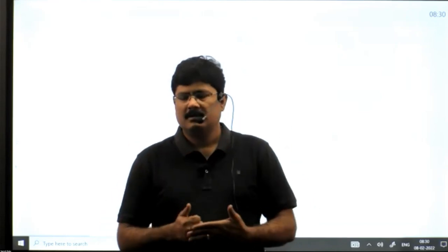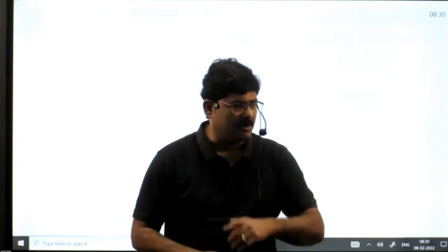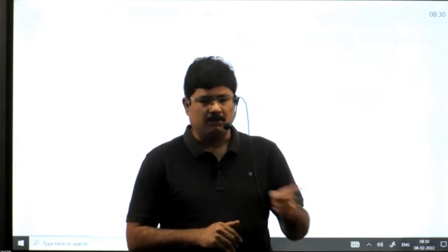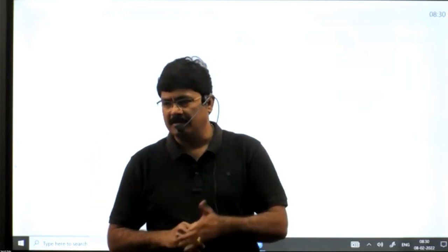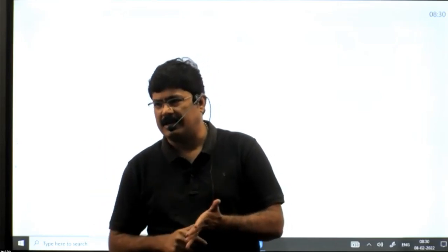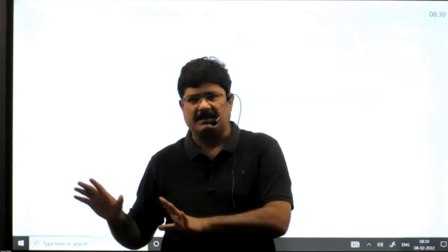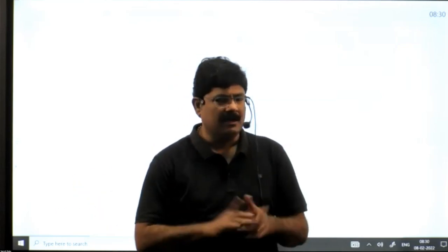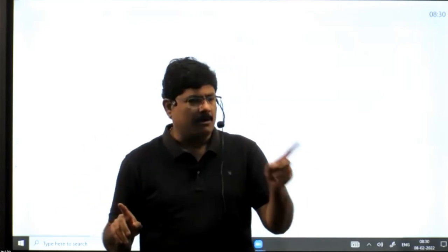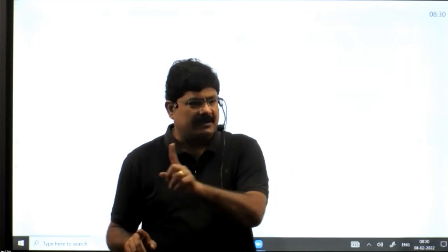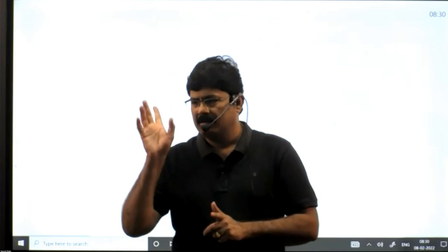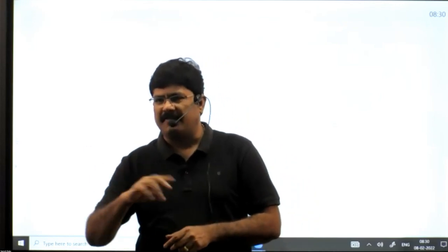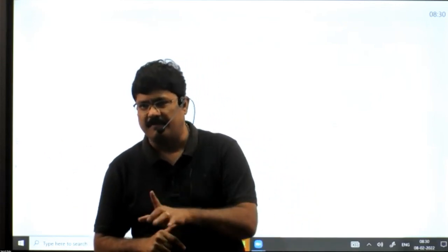Yes. From tomorrow first in the first hour, you give the first build to the QA team. By tomorrow evening, you have to execute these 30 test cases. Let's say totally 30 test cases are prepared for testing these 4 requirements. 1 day time is given. Tomorrow morning, you give the first release to the QA team. By 9:30, release should be ready. By tomorrow evening, you have to finish off all 30 test cases execution, the first build.